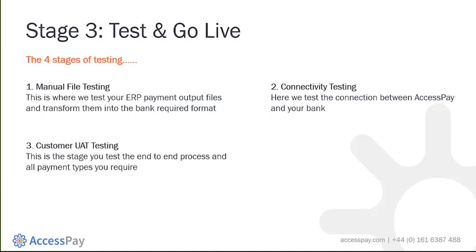Next is the most labour intensive part of testing. This is where it comes to customer UAT. This is the point where you will test the end-to-end process for all payment types and all workflows which have been configured. This should be driven by you, the customer. However, we will provide input on the test plan you might want to use. You will also receive input from your bank on what testing is expected, as they will have their own internal requirements and SLAs which they must meet for testing.